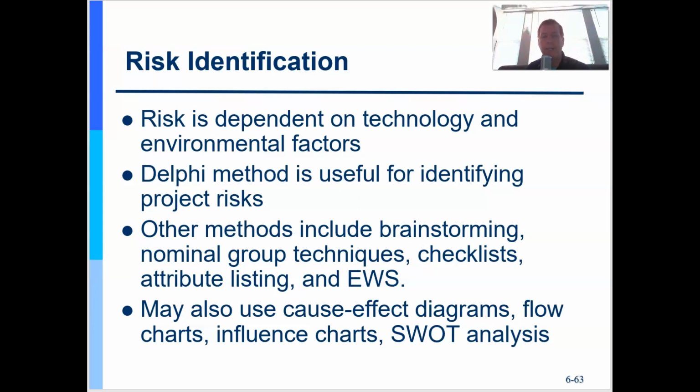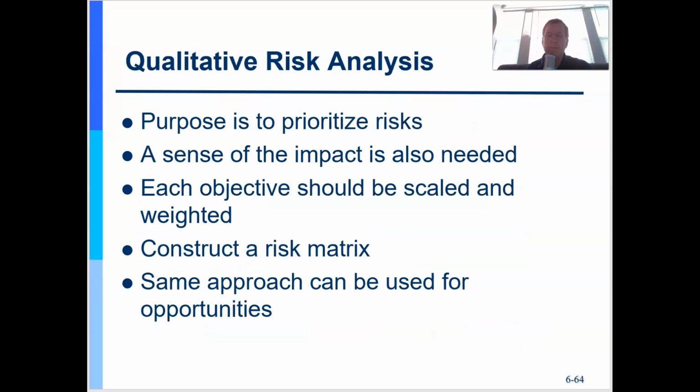So in risk identification, we're going to list them all. Then they're in no particular order yet. Then we're going to categorize them, because remember, if I can categorize a group of risks, maybe I can apply a single response to that entire group also.